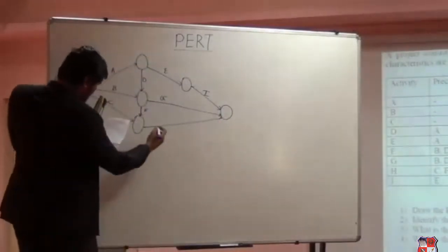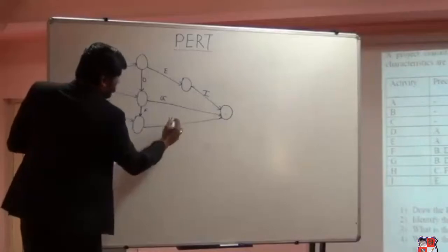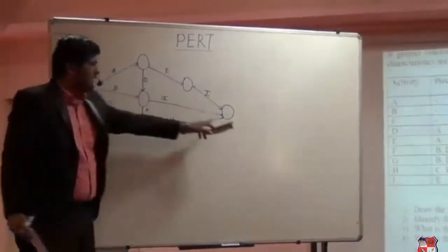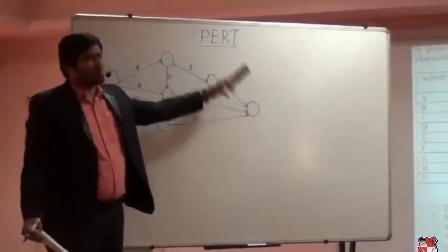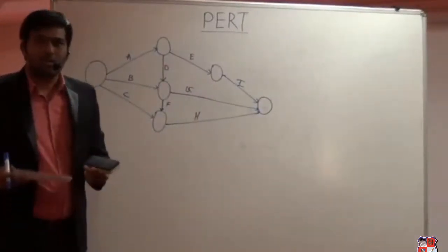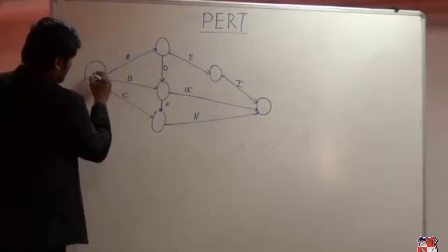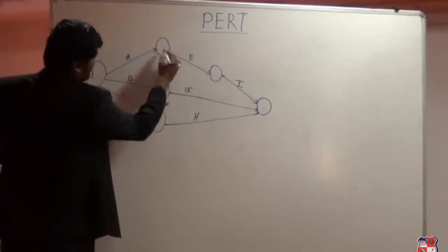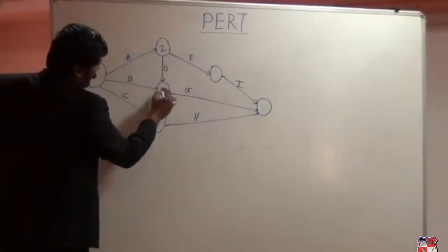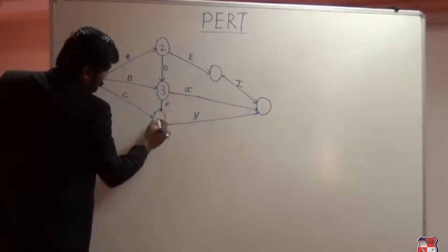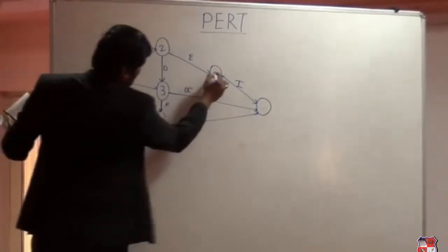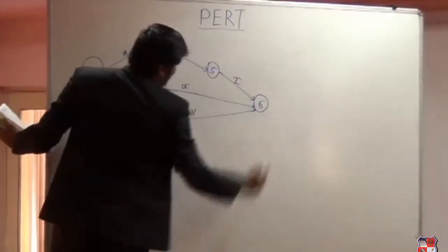You see, this is the correct network. It is starting with a single node and ended with a single node, and it follows all the consequences given in the question. Now, after drawing the network, we need to give the numbers to the nodes. Remember, while giving the numbers, the tail of an arrow node must have the large value compared to the...